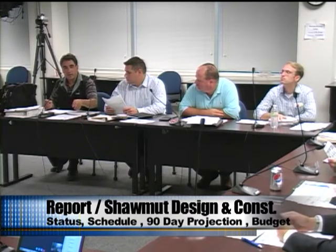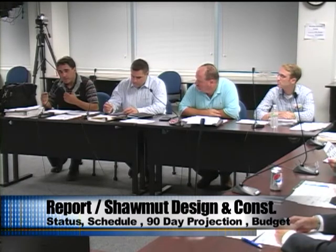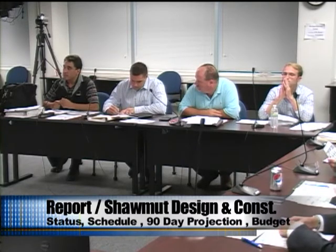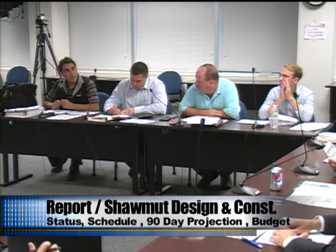we don't have much allowances for damaged plumbing that wasn't known, stuff that's inside the walls. What I did do, however, is we did proceed with our plumber to correct the stuff T&M. It's something that would have to be done no matter what. The pipes in the walls, some of them are cracked, some of them had to be repaired. They have isolated basically every system and have been testing. Some of them, they have started knocking down certain areas where they're like, okay, we're okay in this area. One area, actually, I believe we had to open up one wall in the corridor to fix a pipe that was frozen. And it's tough to get the exact magnitude of it until they're done.